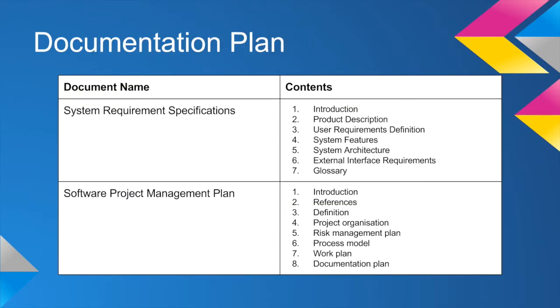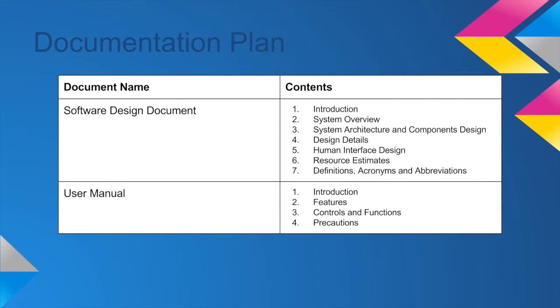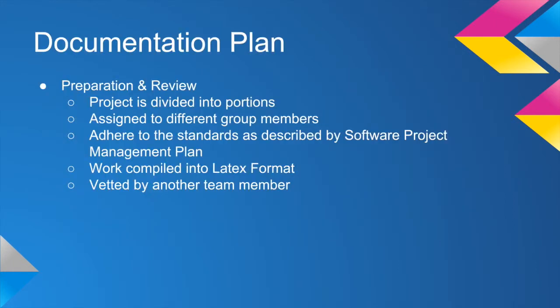The documentation plan has four main documents: system requirement specifications, software project management plan, the software design document, and the user manual as shown. How we prepare our documents is to have the document divided into portions and assign these portions to different group members. Group members are expected to adhere to the standards as described by the software project management plan, and at the end all work will be compiled into LaTeX format and vetted by another team member before submission.